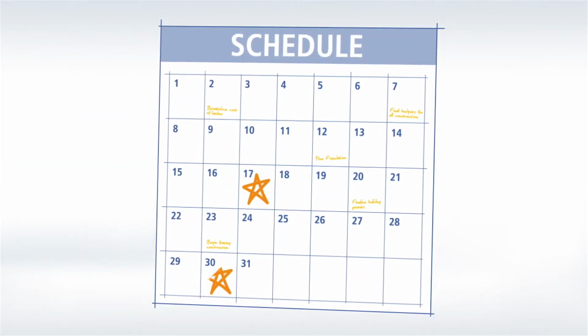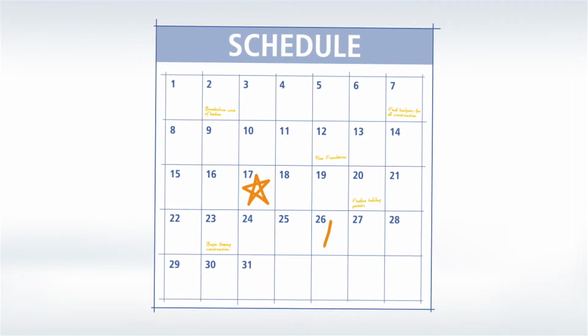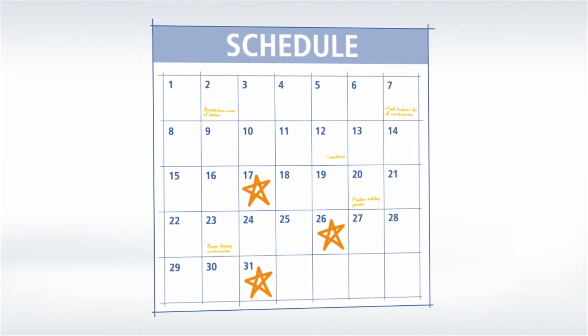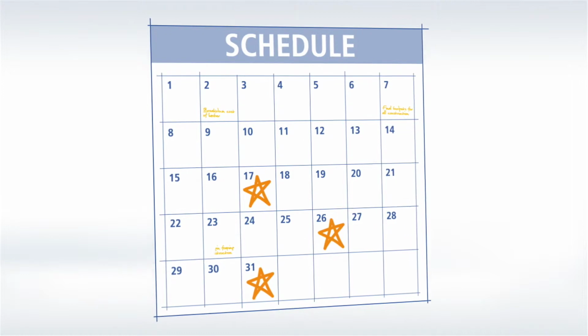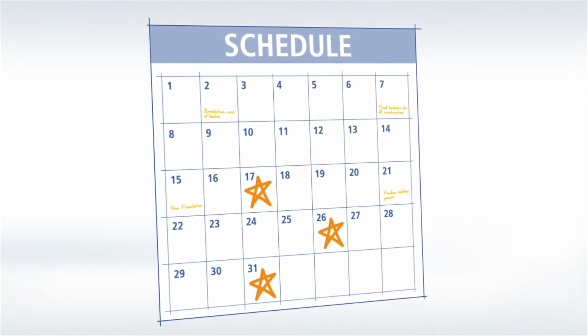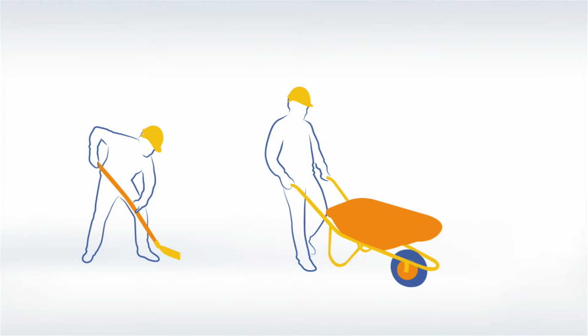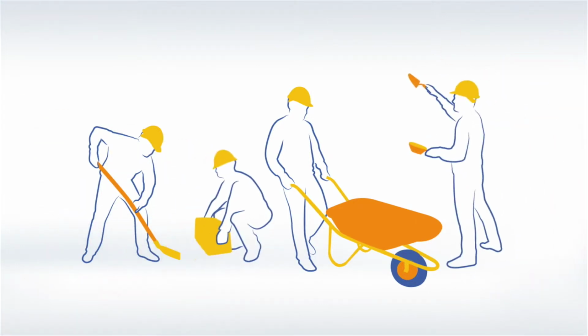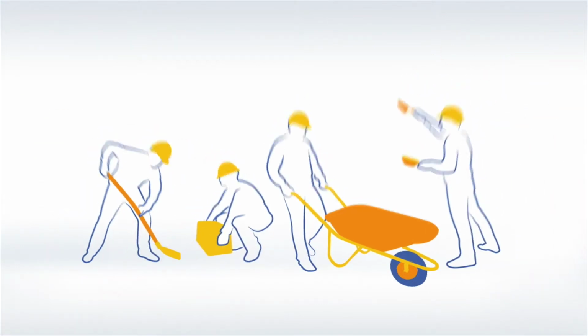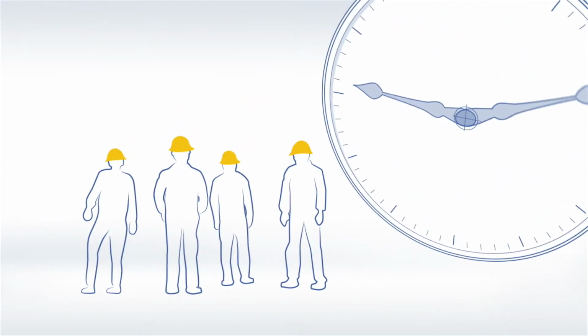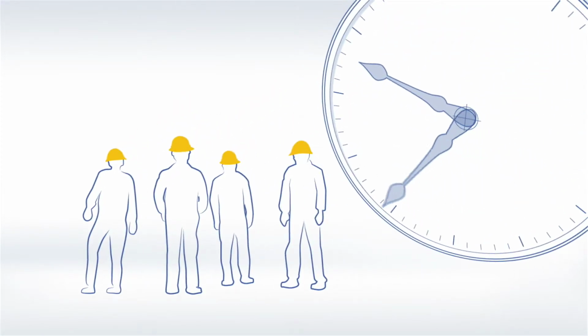It's important when determining the milestones that you talk to the people who actually do the work. They are the experts on determining how long things take and where the materials will come from. Some processes, like framing the house, can be accelerated by adding to your budget in the form of workers. But other processes, like waiting for the foundation to set, cannot be rushed.